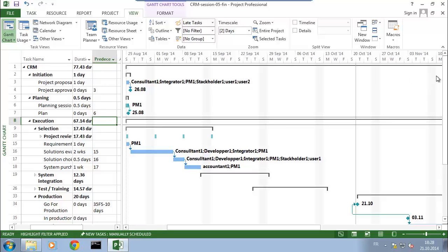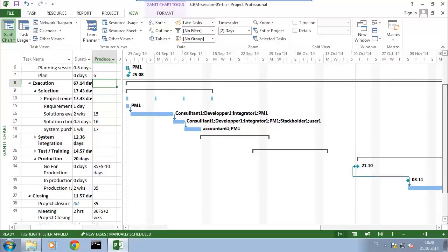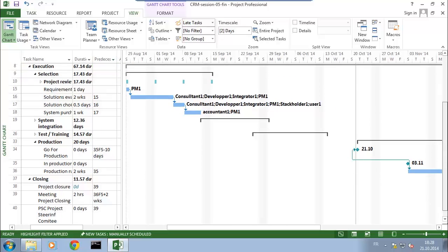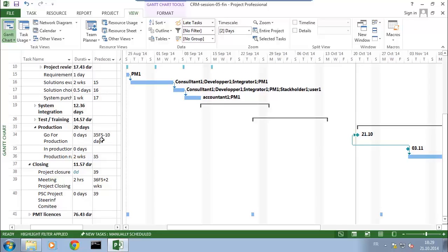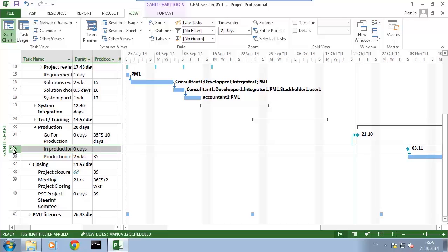I will jump down in this project. It's an IT project in which we will install certain elements, so at one point I will put the system into production. You can see I already have a task called 'in production' with zero days duration — so you'll already understand that I have shaped a milestone here. By giving it zero days and a defined date corresponding to when we want to take the system into production, it shows the diamond symbol for a milestone.